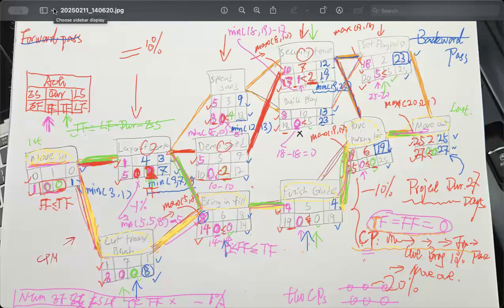And we can check another path, and you can see here is 4. This is 4, but when you move into the next one, you will see this is 5. So this will be adding something over here, and you see this one is 5. So those 2 are sharing this 5 because they have the path over here. That's an additional thing I want to share. The total float can be shared with your next one, but your free float is always less than or equal to its total float.